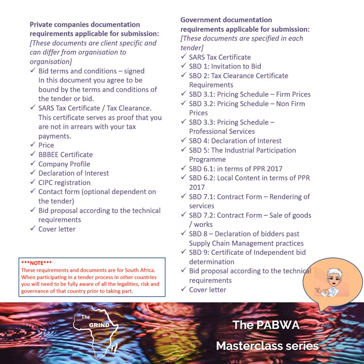The tax certificate is very important for private companies, as well as your BEE certificate. Any declarations, your CIPC registration, your bid proposal, and your agreement to terms and conditions. What you will find with private companies is that they generally send out their contract with their tender document, so you can already start commenting on or agreeing to clauses as part of the bid process. It's not just a tick-box exercise — you need to go through all those legal terms and conditions and agree or disagree. It's very important because you will find yourself in trouble if you win the bid and then don't agree to their terms and conditions.